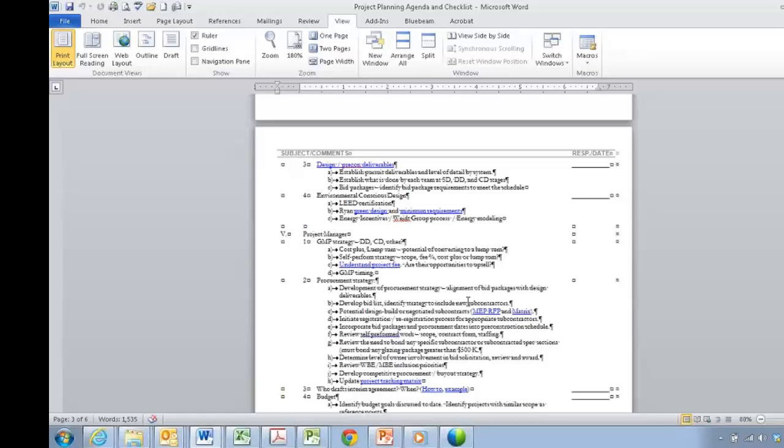If you don't already have hard, steadfast design deliverables when you have this kickoff planning session, it's important to establish them at this meeting. Critical milestones with the various design deliverables, whether they relate to procurement, customer approval, city entitlement and approvals, all need to be identified from the outset, because that will establish a critical path where everybody's efforts need to be focused. And I want to reemphasize the procurement side of that. Many times the focus is city process, and we forget the fact that we may need to get that steel package at a DD stage to secure materials that are 18 weeks out or something along those lines.